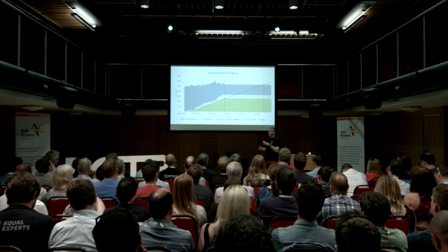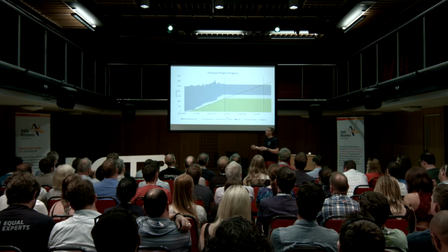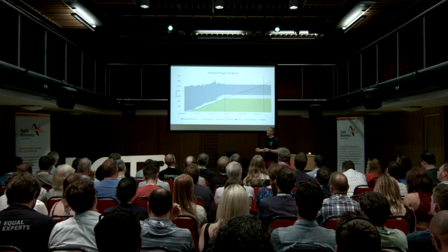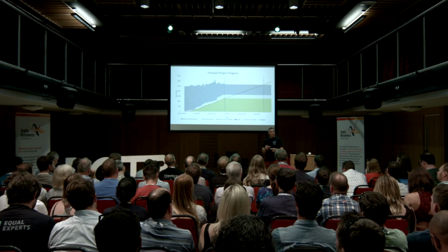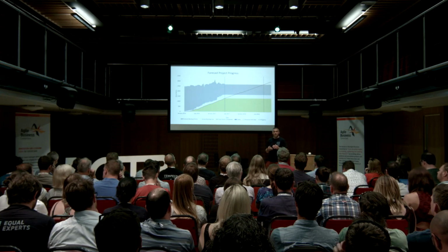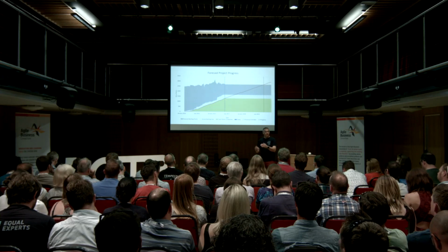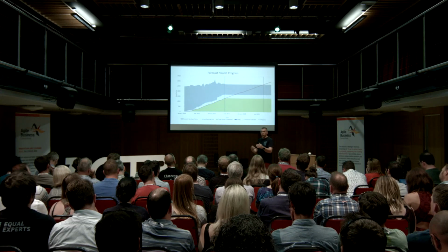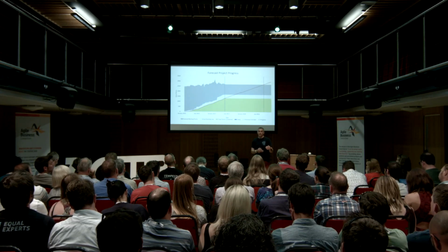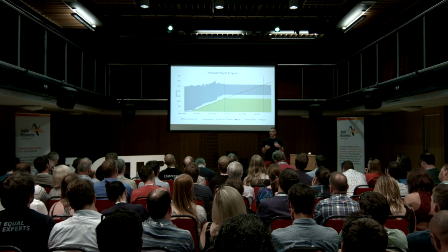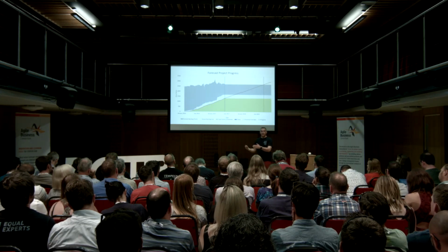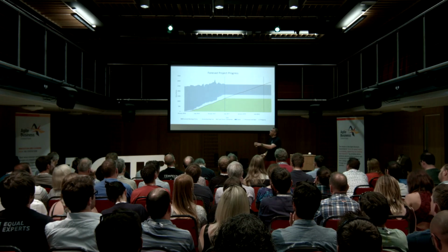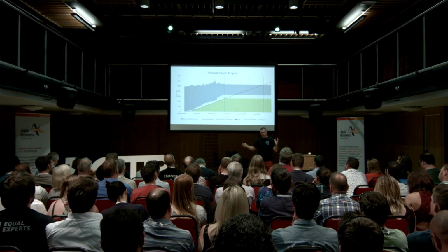So using evidence-based forecasting allows you to start understanding how much work you've got in your backlog. And you generate this every time you generate the chart. As you start to break your work down into smaller and smaller increments and the team start to estimate, we start to get more and more granular values coming back, and the averages become more and more correct, accurate indicators of the actual work of the backlog.